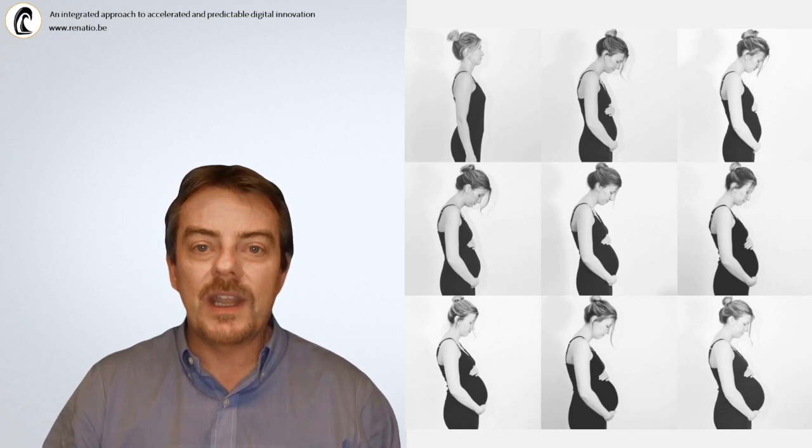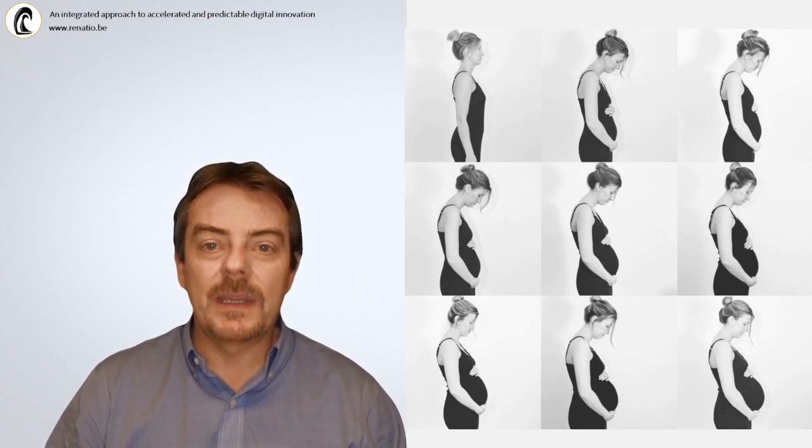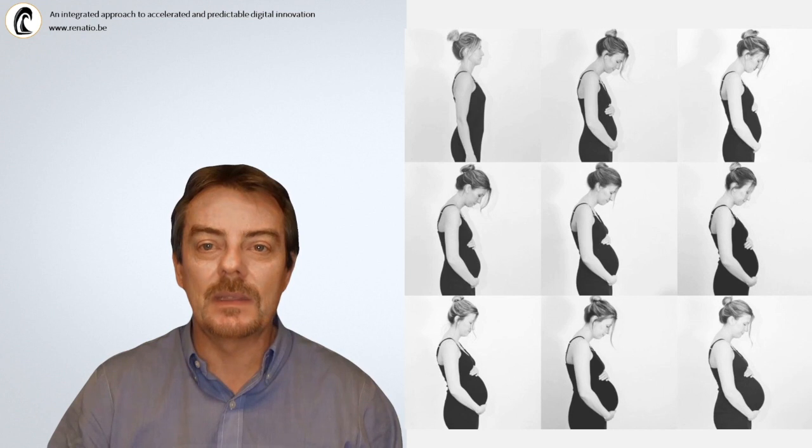Measured lead time is a fair and transparent way to communicate around planning and capacity to deliver. It clearly defines the ability of the team to meet the expectations of the business. Going back to our example, where I was joining a friend in Antwerp for a drink, who is anxiously awaiting my arrival. If I tell him that I will consume 5 liters of gasoline, I am not giving him the information he needs. He only wants to know when I will join him at the bar. Or in other words, what my lead time is going to be.